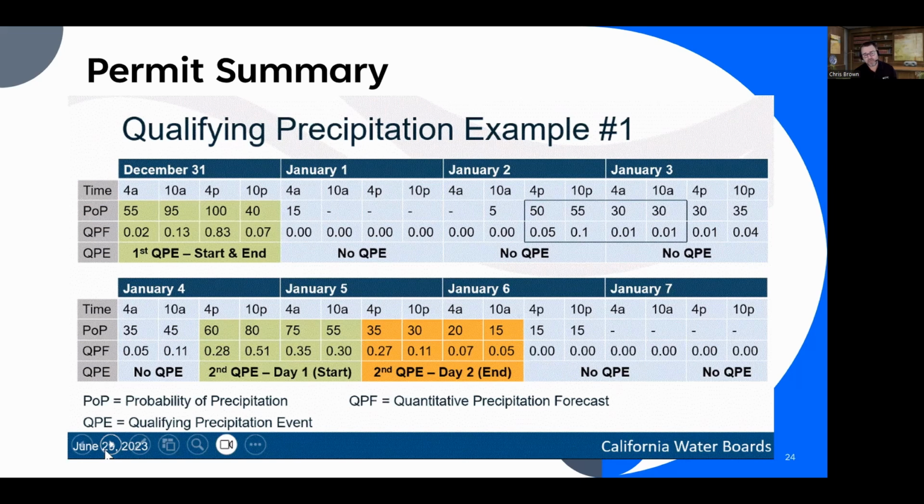We're checking the rain every day. Oh, there's that 50%. And we look down at our 4 quarters. Notice that it's over a 2-day period. I have a lot of questions about this, but that's fine. It doesn't matter. I'm 100% sure. 24 hours, I look at these 4 quarters. It does not add to half an inch. There's no QPE. Checking the rain every day, cruising along.